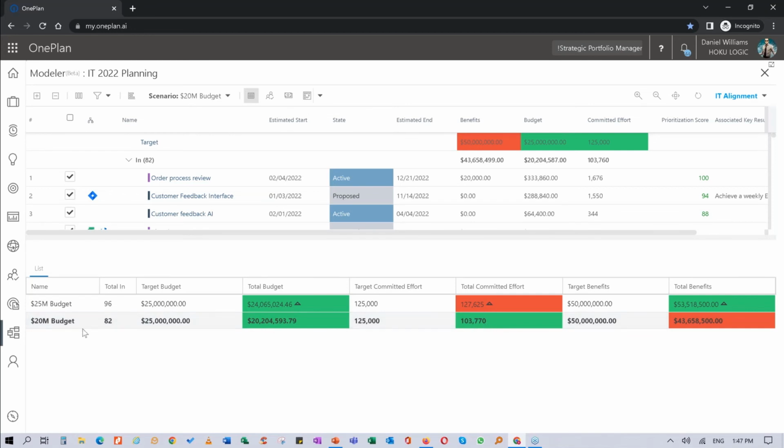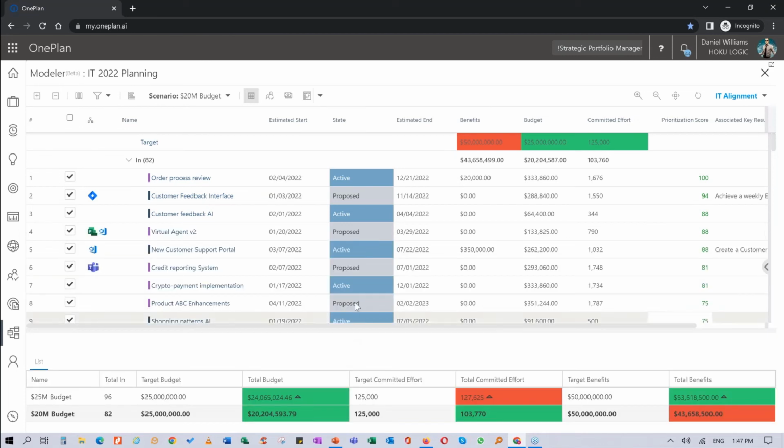Again, if you were in a situation where you already know that in the next quarter you're going to be with less funding, you could already have that analysis done so that you can come in and show leadership how you plan to achieve that constraint. In this case we're basically reducing 14 projects because of our 5 million shortfall. And all the data is available for reporting. If we wanted to dig even deeper, that is there.